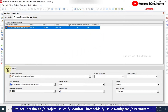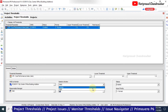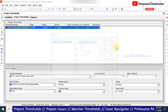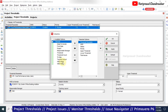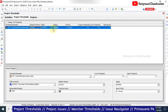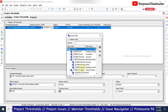We don't have any issues yet because we haven't monitored the threshold. In General settings, we can select what to monitor - WBS or Activity. I'll select Activity so it will monitor activities directly. You can also select the detail to monitor from here. I'll select the whole WBS, and within it we are going to monitor the activities.